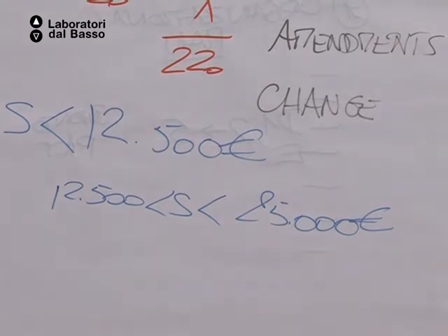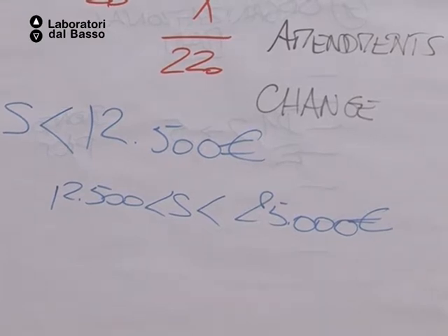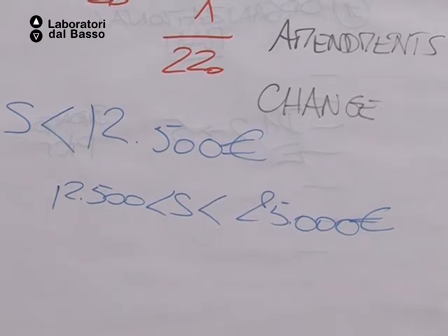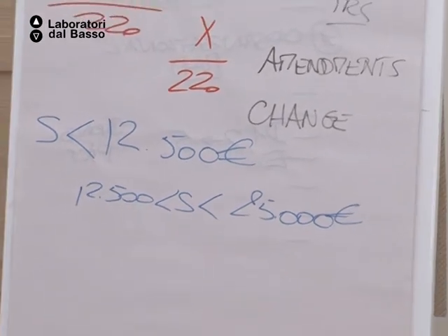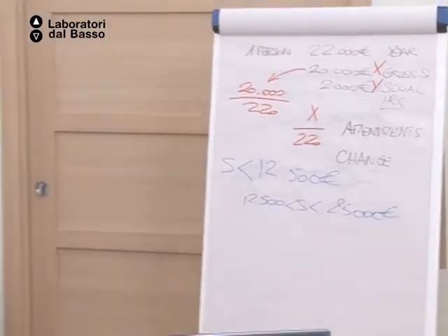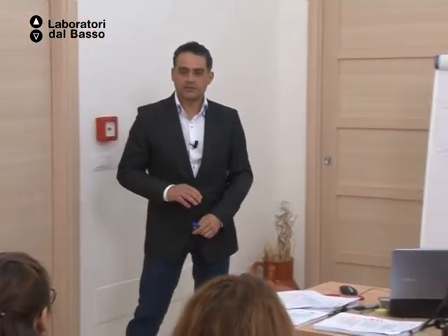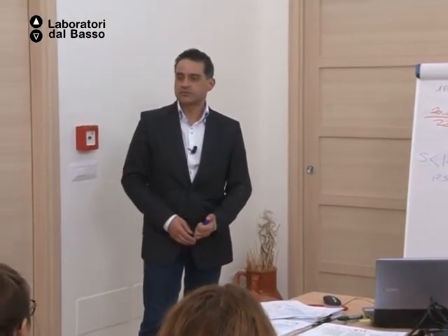This is also to check your seriousness. You know, you might subcontract your friend, or a company where you're also a shareholder. You're not allowed to. If you go between 25,000 and 60,000 euros, you need 5 tenderers. And if you subcontract something with a cost above 60,000 euros, then your national applicable rules of public tenders apply.